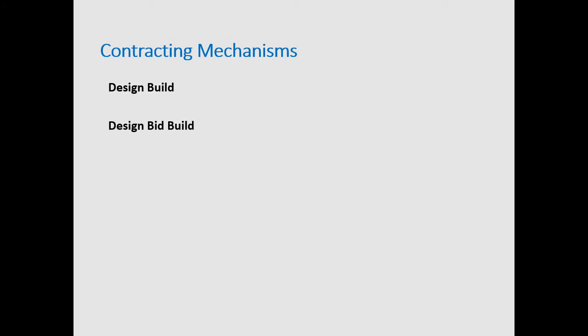Different set of deliverables. When you go to the design bid build, you have multiple reviews with your owners. We had it with the design build, but not to that same level. The design bid build was finished in November, December last year, and the equipment's not going to make the barge, so they haven't advertised it for contractor bid yet. They anticipate late summer this year for next year's barge, so it's probably going to be a 2021 construction, unless the contractor that's out there wins it and starts working this fall or winter. But that's kind of the schedule.